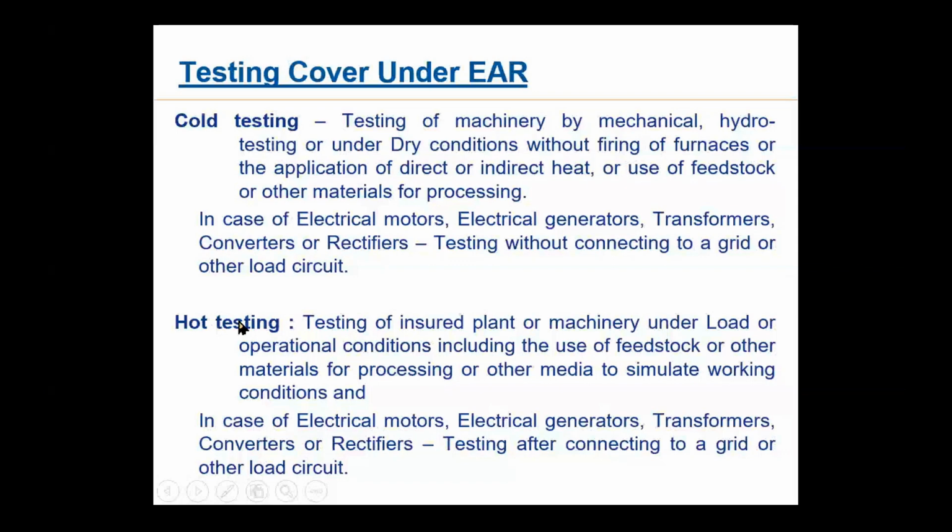Now in case of electrical machines, we do testing after connecting with grid. Here it was without connecting. The only difference is in case of electrical items, here testing is done after connecting to the grid or other load circuit. This is hot testing. The difference is quite simple, a marginal difference. Here heat, etc. is not to be given. Here it can be given.